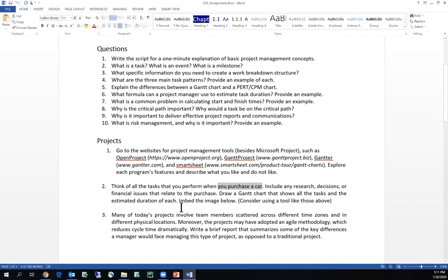Now, here's a big thing I just want you to get. Do not just pick all constant sequential tasks. Purchasing a car doesn't have to be done with do this, do this, do this, do this. There are certainly moments, I would think, where you can have one task that then has two other ones running concurrently afterwards, and then you get one thing done after that.